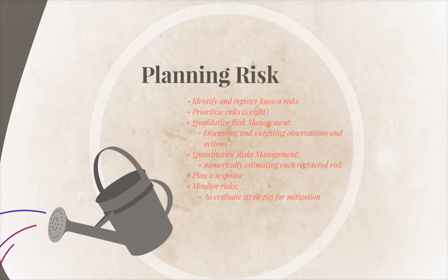The idea of this whole thing is creating a plan for response, and the response being, one, can we accept this risk? Can we take on this job, this work, this contract? And once you're inside of it, having a systematic method at milestones or in between markers to monitor these risks and make sure they're not escalating beyond what you prepared for them to be. And if there is a risk escalation, looking at the plan that you've developed prior to understand how you're going to strategically minimize or mitigate this risk that's being elevated.